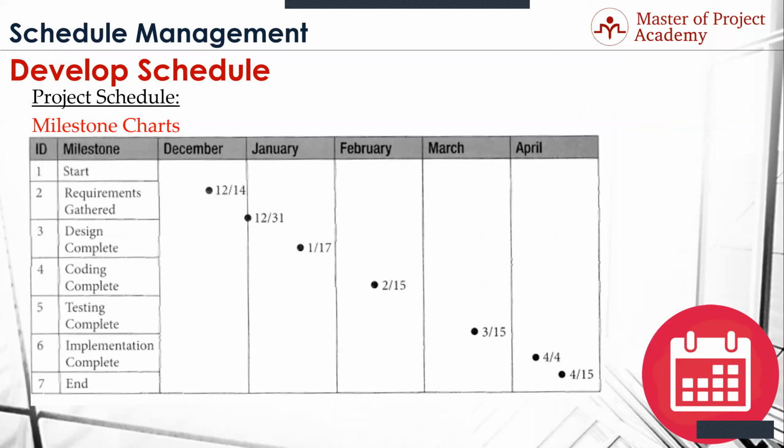Now, the key about a milestone chart: if you're briefing a higher level person in your company, and I'll let you define that, you would use a milestone chart. You don't want to brief them with a network diagram. I mean, yeah, they might demand it, but this is the tool of choice. If you want to, you can use other things, but this is what PMI says.